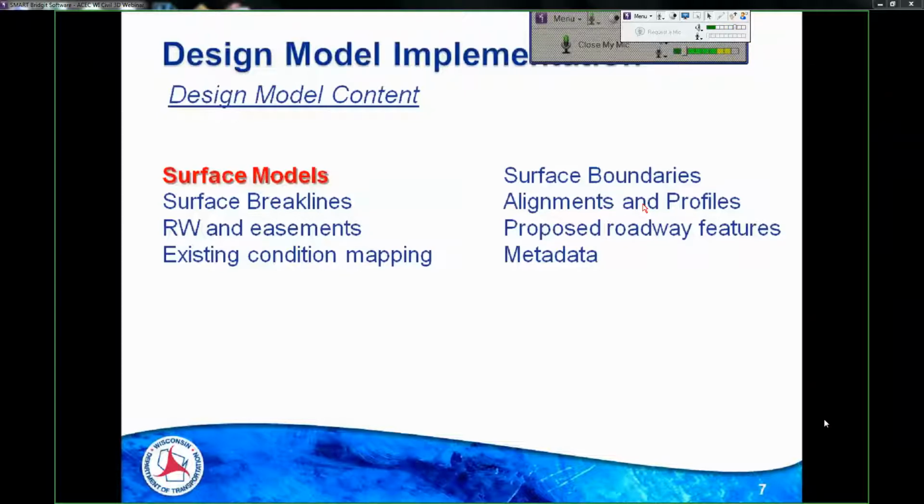Contractors can take that and look for the best locations for borrow sites that are adjacent to the project, or possibly waste sites, okay? And so when they do make that initial site visit, instead of trying to identify these locations, they've already picked out their optimum spots and they can focus right in on those areas.